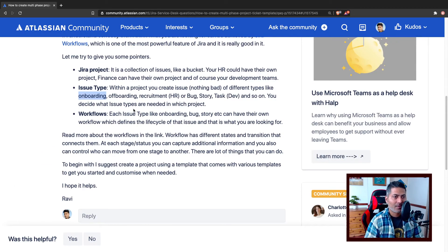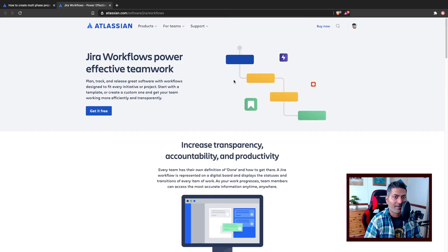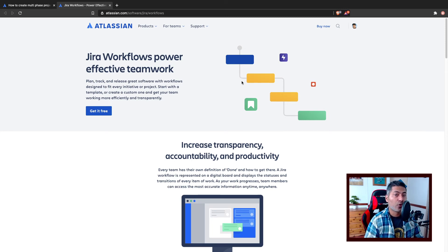Using workflows, you can assign the issue to someone, then reassign it to someone else. When you do this reassignment, you can ask the user to fill in some additional information. When you create a workflow in Jira, you have different states, and when the issue goes from one state to another you can capture additional information. In a workflow, you have states and transitions — transitions are represented by lines. When you go from one state to another, you can display a screen or form to capture more information. You can also control who can perform a given transition.